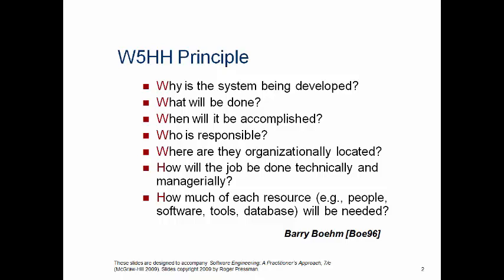The questions are: Why is the system being developed? What will be done? When will it be done? Who is responsible for a function? Where are they located organizationally? How will the job be done technically and managerially? How much of each resource is needed? By answering all these questions, one can develop the project plan, which leads to an effective and successful development of the software project.